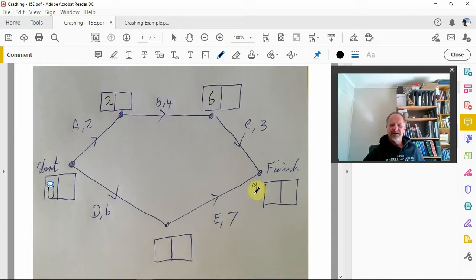And we'll check around the other way. So it starts at 0, takes 6, so 6 in here. Then takes 7. 6 plus 7 is 13. So the number that goes here is 13. We can't actually finish the job, even though this might only take us 9 hours to go around here. We can't finish the job until this task's finished. So 13 there.